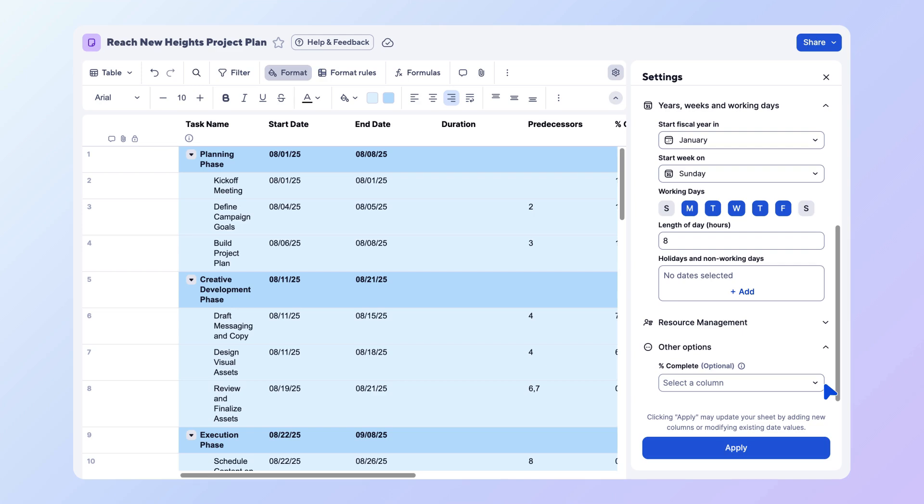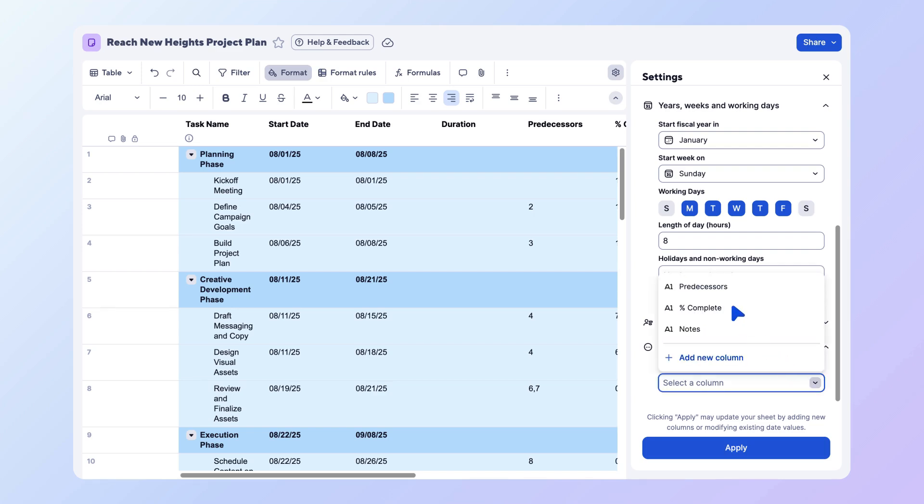If you want to visualize the progress of each task in Gantt view and have percent complete automatically calculate in each parent row, you can also configure a percent complete column. Choose an existing percent complete column or add a new column.